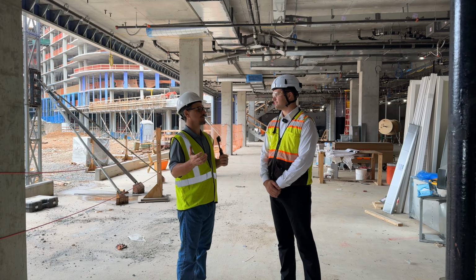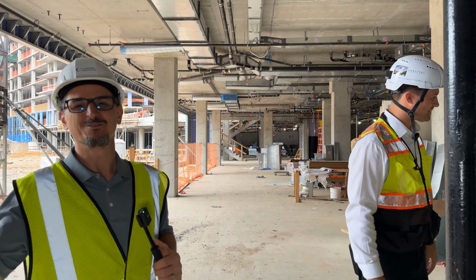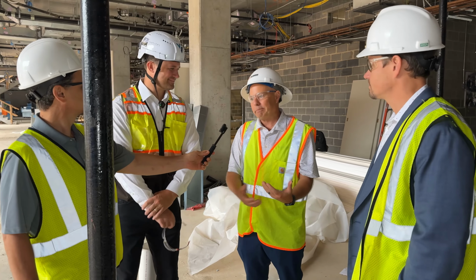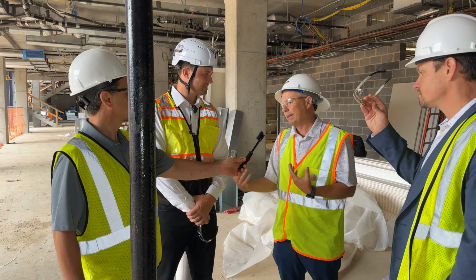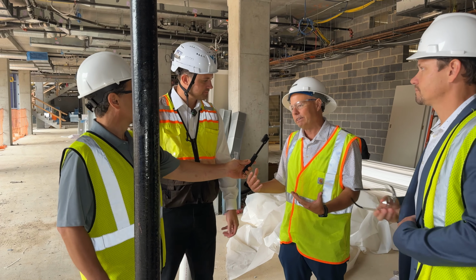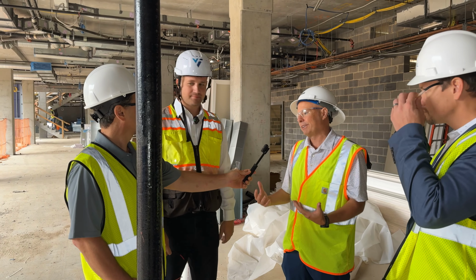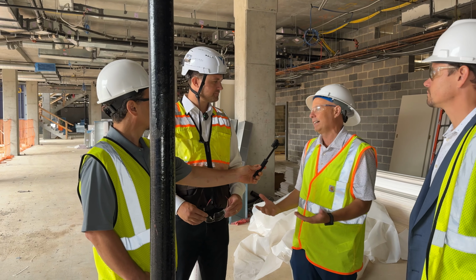Another thing: you can talk about how people think it's easy. You go through a VE process. You can say, well, with design build there's no VE because we design it efficiently up front. A lot of times we talk about doing VE, value engineering, on a job, because in a plan and spec world, the designer puts it out, but it might not make the most sense from an installation point of view, or from a manufacturer's point of view, like we've got better equipment that could do this job that you might not have thought of. Whereas when you do design build, none of that happens because everybody's working together collaboratively up front in the design, so there's no VE because all that's already incorporated into the final design.